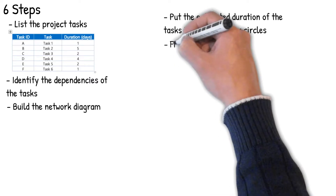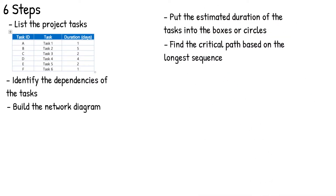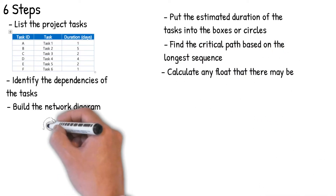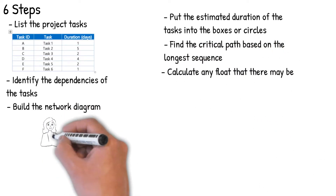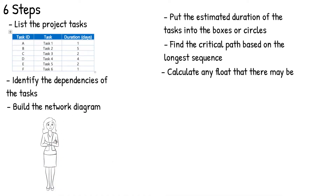Put the estimated duration of the tasks into the task boxes or circles. Find the critical path based on the longest sequence. Each sequence is simply the list of tasks that are dependent on each other. For each sequence, write down the start and end time. The first activity has a start time of 0, and the end time would be the duration of that activity. The next dependent activity's start time is the end time of the previous activity, and the end time is the start time plus the duration.